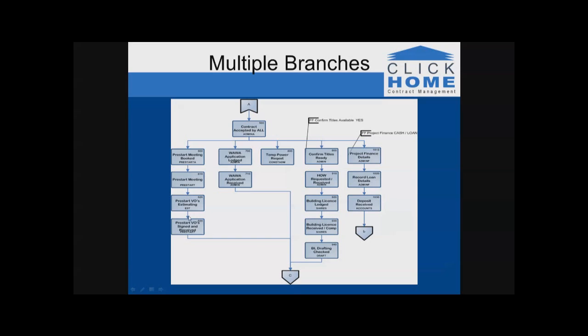So if you complete the pre-start sequence of tasks, and you complete the building license, and you're still waiting for the water application received, then you'd sit here waiting for that to be received. Once that's completed, then you'd kick off the rest of the process.